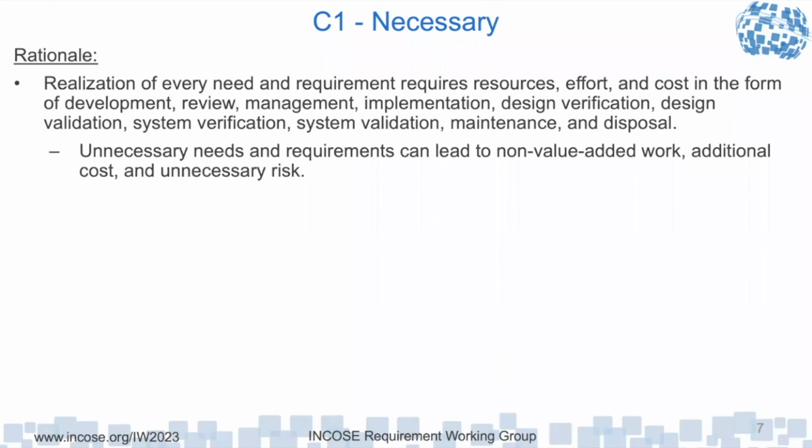Yeah, in government programs I've seen it's very common that at the system level, requirements will have threshold and objective values, where the threshold is the minimum performance that the system has to meet. And then the objective is some additional capability that you'd like to have. But the actual contracting happens at a lower level, like at a subsystem specification level. And then at that level, it's up to the government organization to decide if they want to incentivize the contractor to meet that additional capability beyond the threshold.